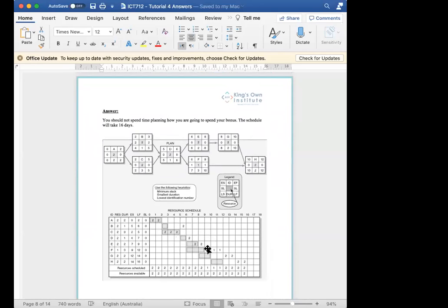Then I have to use F, then H, sorry, then G, then H. This is a very straightforward one, nothing much. There's no slack, nothing could be delayed because we are maximizing the use of our resources at all times. And even at the stage where we haven't maximized the resources, we can't really increase any duration for any activity.